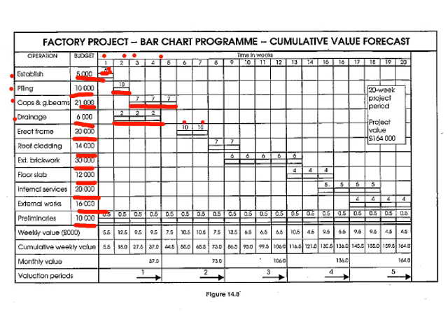You can actually go into more detail and divide it more evenly. If you're using a program like CCS or Microsoft Project, you can actually do it very accurately, where in the first week you will have more expenditure than in the second week. You will have more resources allocated within the first week than in the second week.